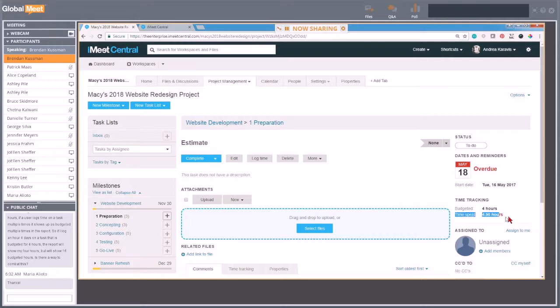The total time spent now exceeds the budgeted time, but the time that you budget is not based on the number of business days, it's the number of hours that you actually expect them to work on the project. So, if you log an hour 4 days on a task that is budgeted for 4 hours, the report will show my 4 hours, but will show budgeted 16 hours. Is there a way to combat this? The answer is reduce your budgeted hours so that it doesn't match the number of days, but instead the amount of time you expect a person to work on it.